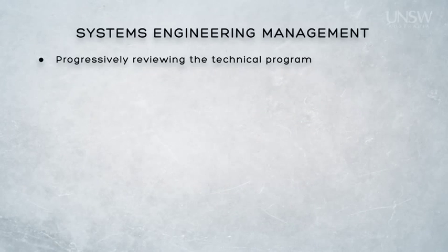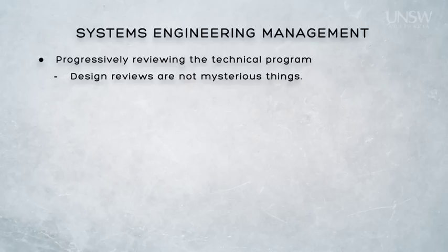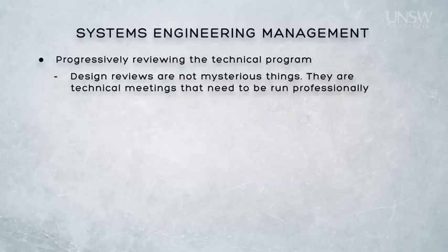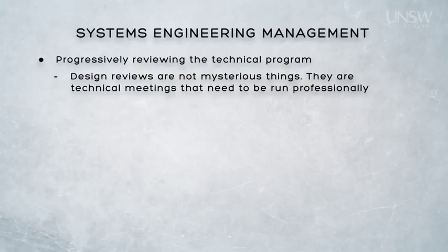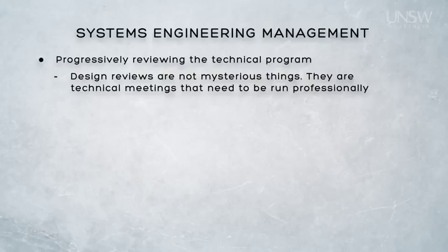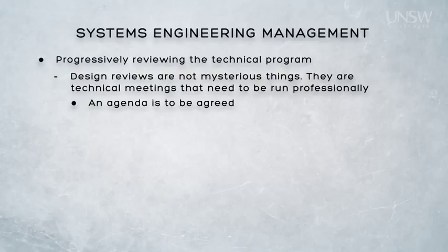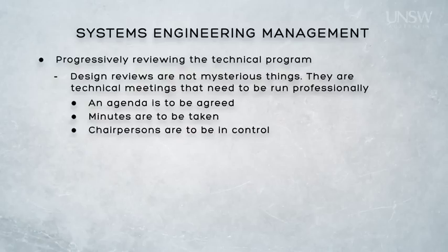The names of these reviews are not important — it is the concept of periodic and progressive review that we are trying to talk about here. Conducting reviews of this nature just makes sense, and they are not mysterious systems engineering activities. They are simply technical meetings that are conducted in a controlled and professional manner, involving appropriate groups of people that aim to review work packages, approve plans for the next stages and resolve any problems that are facing the development effort. This means having an agenda for each review which outlines what's going to be covered, how long it's going to take, and who is leading the presentations, ensuring that minutes are taken and agreed upon prior to the conclusion of the meeting, and an agreed chairperson to maintain control.